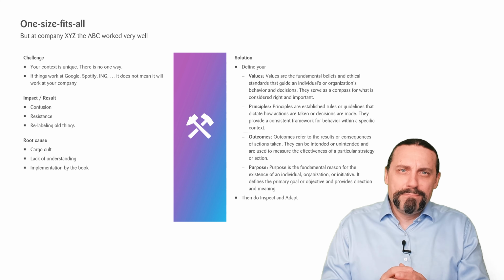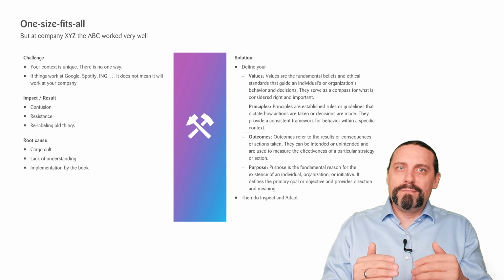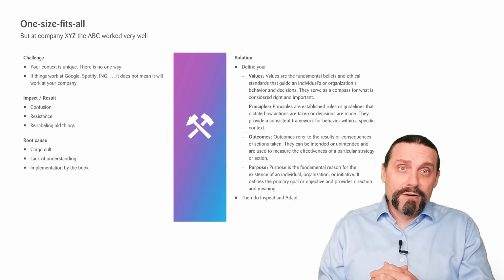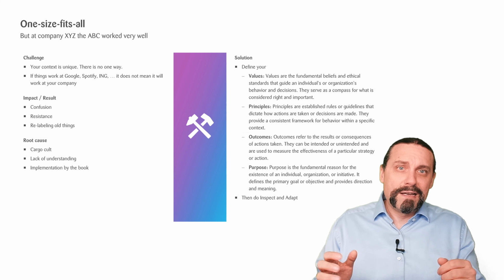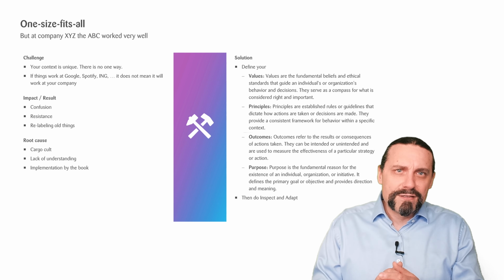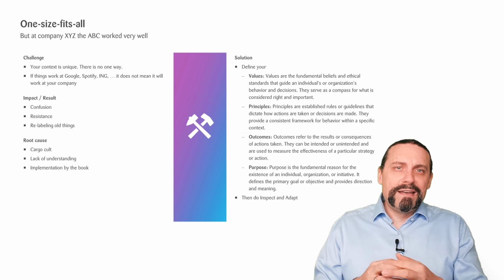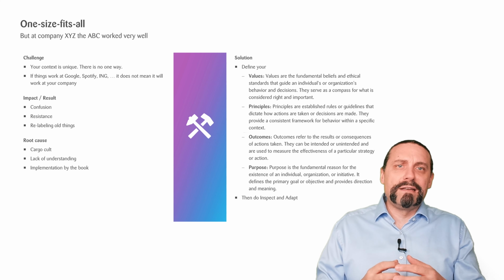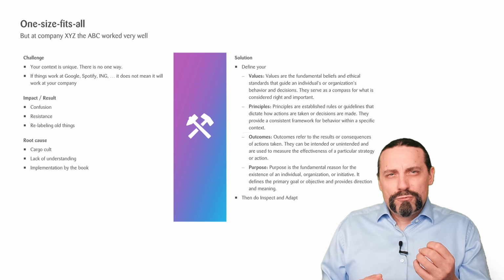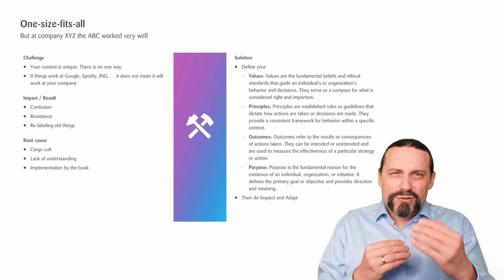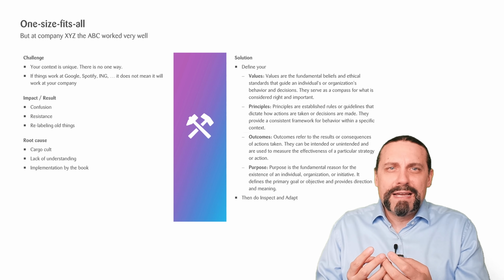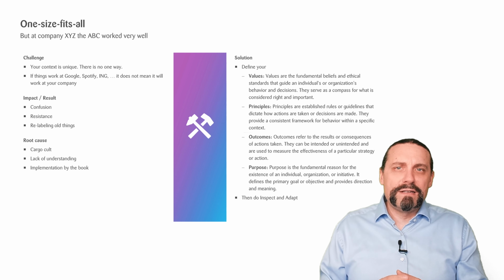For example, when you implement SAFe just by the book and you don't implement continuous improvement, you will just relabel the project manager to an RT or a Scrum Master or whatever, and your 3 months release cycle will then just be a PI. And everybody will say, hey, everything is now slow, everything has an overhead, and so on. And you don't get the real benefit of doing Agile or DevOps. Again, here, the root cause is just doing it by the book, not doing continuous improvement. And also, you see clearly, it's a lack of understanding how to implement such a transformation.